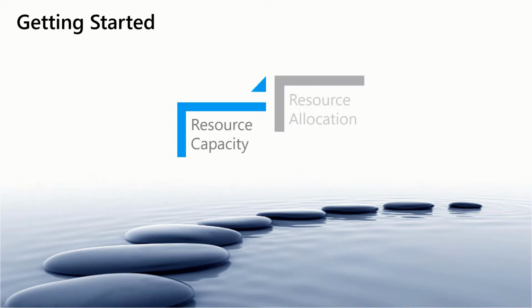And most people will get started from a resource capacity or more of that top-down, higher level capacity planning, so they at least have a look ahead to give them a sanity check of, do we have the wherewithal to deliver to what we're committing to? And maybe then move on, once they master that, into a more detailed resource allocation if they desire to do so.